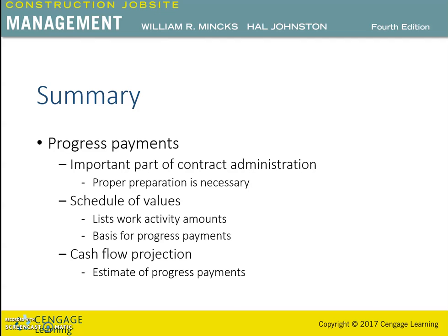So these formats use a detailed sheet to show the completion of each payment item, material stored, amount remaining, and appropriate and proportionate amount of retainage held from each item. So the application and certification for payment includes certification for both the contractor and the architect, a change order summary, and a computation of the current progress payment.